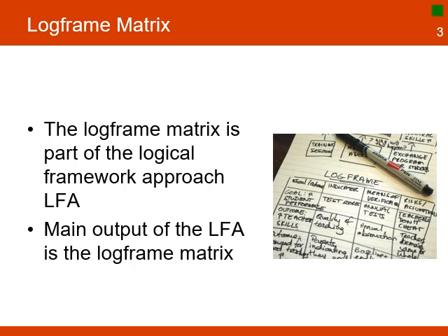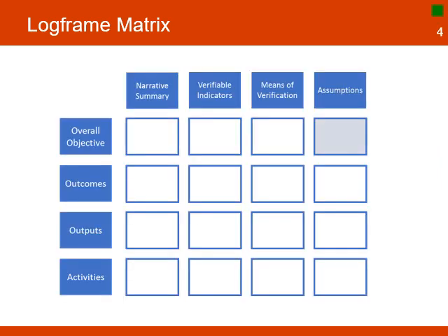The technique is used for planning projects, providing an objective basis to evaluate projects and to state assumptions about causal linkages. The log frame displays the key elements of a project design and their relationships to each other in a way that facilitates project analysis and guides project implementation and monitoring and evaluation. The log frame consists of a table with 4 rows and 4 columns, and it sets out the logical sequence of cause-effect relationships based on the results chain and objectives hierarchy.